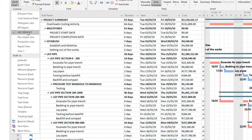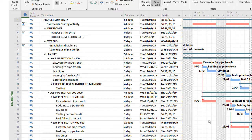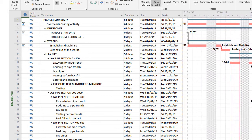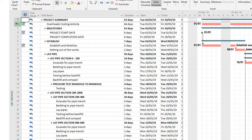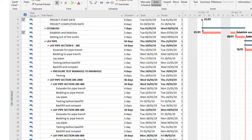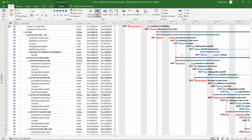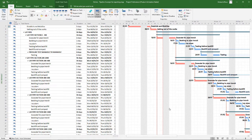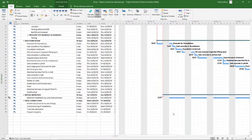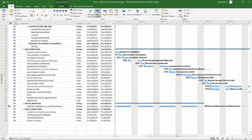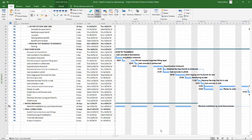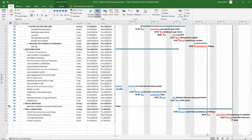Once I've done this, second step is to set up my Gantt chart. Let me just close that for a moment so you can see what I did. Not a difficult schedule to set up. The only thing that you need to add if you want to do an estimate is to have some sort of overhead costing activity, where I can price all my overhead costs like the site office. And then I've got all my laying of the pipe sections divided into 200 meter sections. I've got a pump room that I've scheduled very high level, and then the installation of the manholes and final connections at the end.